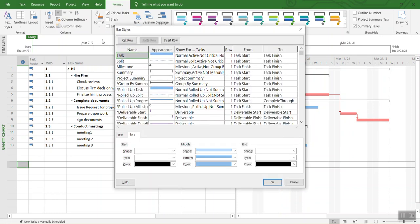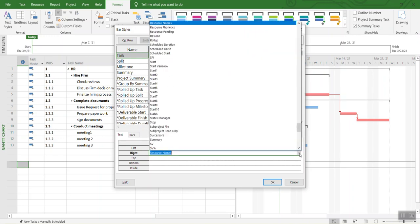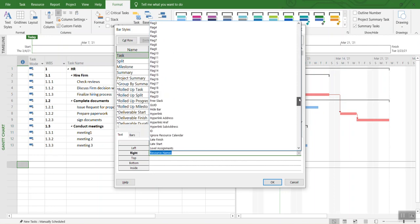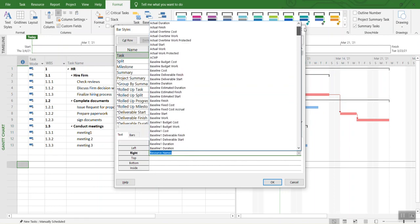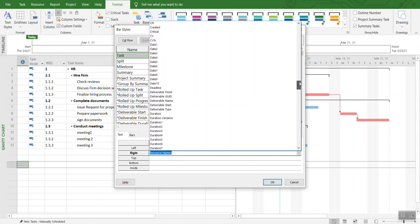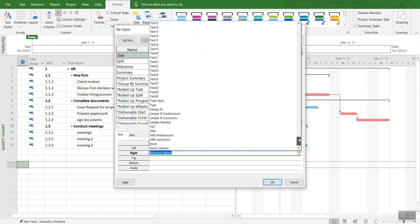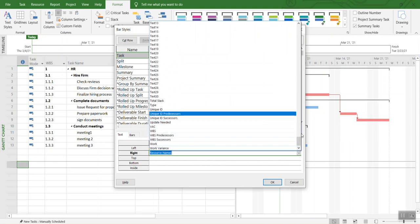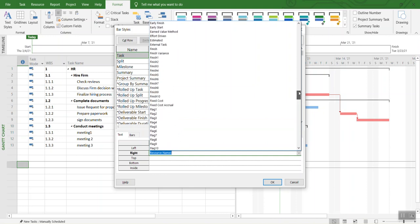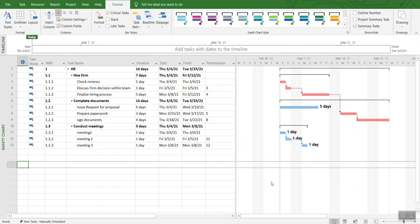Once you're in Bar Styles, you're going to see at the bottom that you have the Bar option and the Text option. If you see the Text option, by default on the right-hand side it's set to Resource Names. You can explore this dropdown, and if you're looking to display any specific information, you can go through all these items. These are the items you can display on the bar chart or Gantt chart. What we're going to do is select Duration in our case, and it's going to appear on the right-hand side. Click OK.